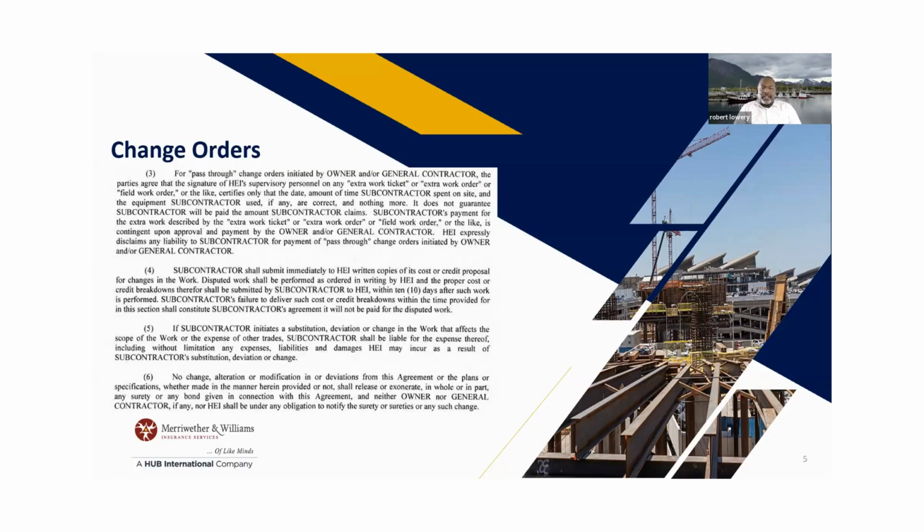If you see a back charge at the end of the project, then say, hey, where's the documentation that you notified me of the back charge? Then you can challenge that, but just be aware of these back charges. And it can come down to cleaning. If you're not keeping the site clean with your work, they might give you one warning, hey, clean up better. Then they're going to give you a second one, and then they say, okay, we're going to give you a back charge. That back charge is going to be the cost of someone else coming in to correct the deficiency that you have created, and then they're going to deduct that from your contract value.